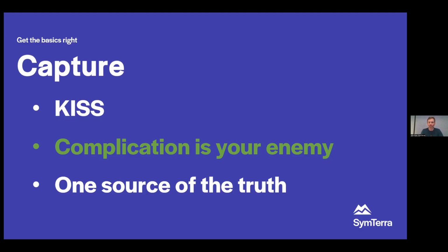The simplest system is a form-filling system that links to a spreadsheet. Google Forms and Google Sheets is one of the more popular solutions that captures data easily and allows you to reuse information in other ways. The forms themselves are the source of many issues. And to share what we've learned from Centera, with over 100 companies working with us, we have seen that tick box questions and yes/no questions in forms are really not your friends.